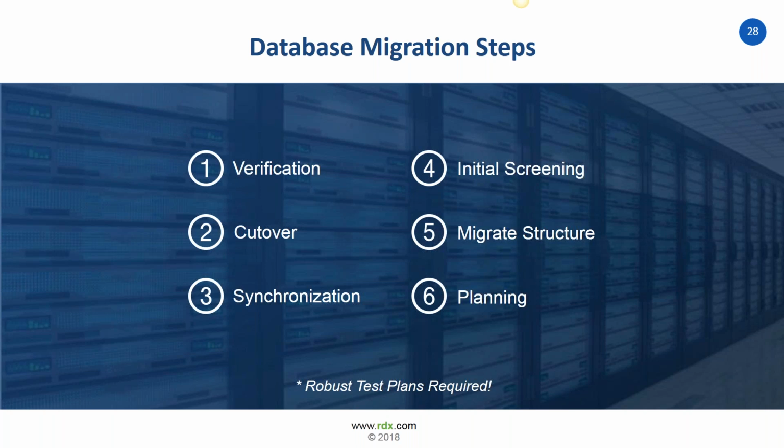At the end of the planning phase, you should also be able to more accurately estimate the level of effort required to migrate the database and the rental fees incurred once you're up there. Your project document will include the mechanisms you've chosen to upload the database to the cloud. In addition, it will document the steps you will execute to perform the migration and verify that the process has completed successfully. As I stated when I started discussing this slide, cloud migrations are much like any other tech project. Robust testing and verification will be critical components of your project plan.